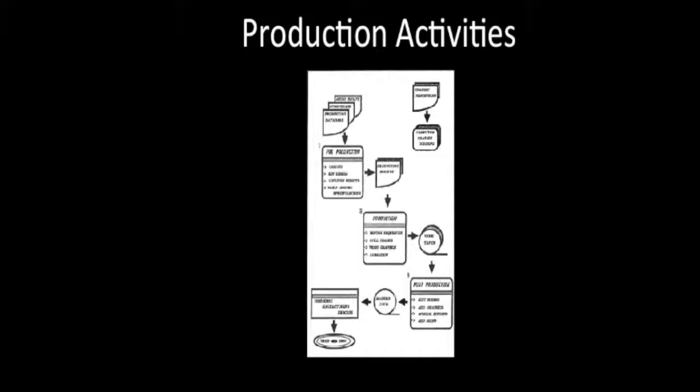In the producing phase, all of the scripts, storyboards, artwork, and flowcharts become viewable media. Everyone involved thus far in the project evaluates the media and must be in agreement on the production of the media content. This phase is the most expensive part of the project, and this is where all of the media is produced. The evaluation phase is used to correct issues with the media, and the deliverables for this phase are each independent media project.